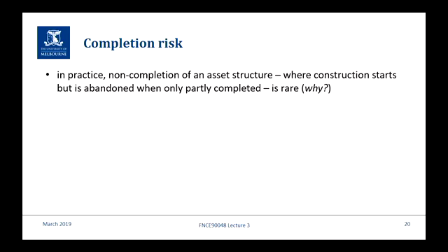Now the reason for that is that if the price goes up, and I've touched on this last week, if it costs more to finish it, it's still better to finish it, maybe as a negative NPV project, because that negative NPV will be much lower than the negative NPV of walking away and repaying 800 million for nothing.